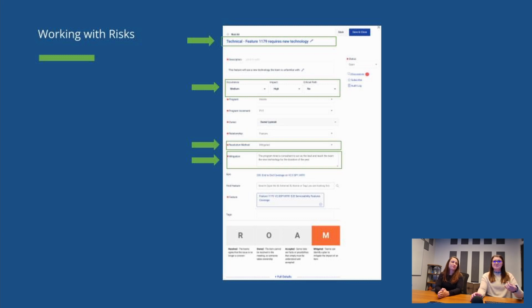And if the risk comes up again, or a similar risk in the future, we have that documented and maybe can utilize that for resolving future risks as well. If you choose the owned status, the owner field does become required if it wasn't already. That accepted status doesn't require any additional fields, so it's great, again, to treat more as a default status, and then we move it to one of the other three categories during that ROAM exercise.